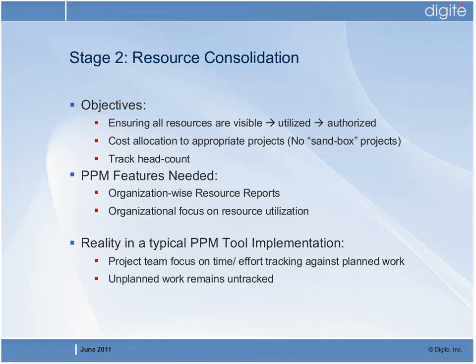And typically, what happens in the PPM tool implementation is that there is an increased focus on the project team's part to do greater time and effort tracking against planned work. What remains untracked, however, is the unplanned work, because in a lot of our customers, not everything gets defined as part of the project Gantt chart or the project WBS. A lot of work happens outside of that, and that continues to remain untracked.